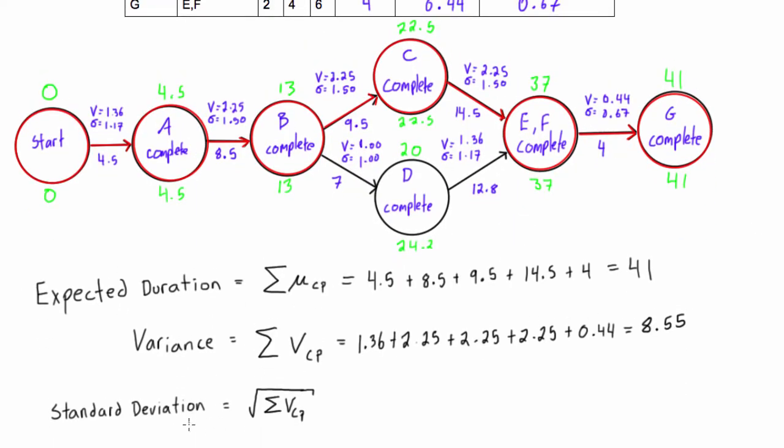All right, so the last thing here to look at is standard deviation. You can't actually just go and add all of the standard deviations for each activity along the critical path, and this has to do with something called the central limit theorem.